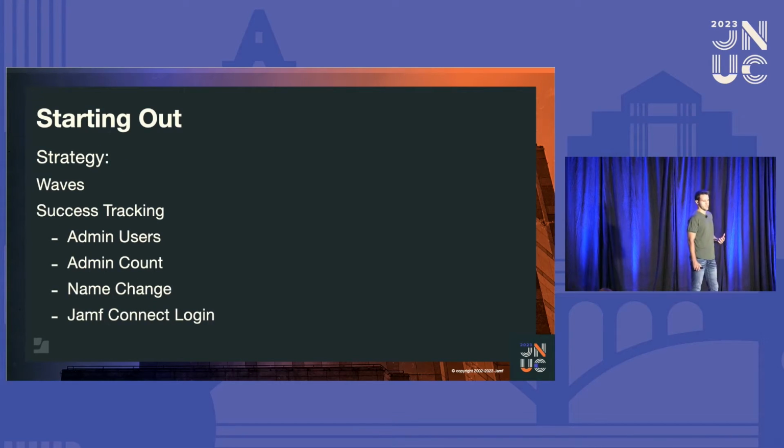Let's talk about our strategy. Sprinklr's strategy was breaking devices down into waves. Waves were broken down by department and org unit. So our first wave was the beta wave, which was 56 devices. Waves 1, 2, 3, 4, and 5 combined equal 200 devices. Waves 6, 7, 8 were about 300 to 500 devices per wave. Now, for those who are good at math, you realize that's not 4,000 endpoints. Well, wave 6 was 6.1, 6.2, 6.3, same thing with 7, etc.